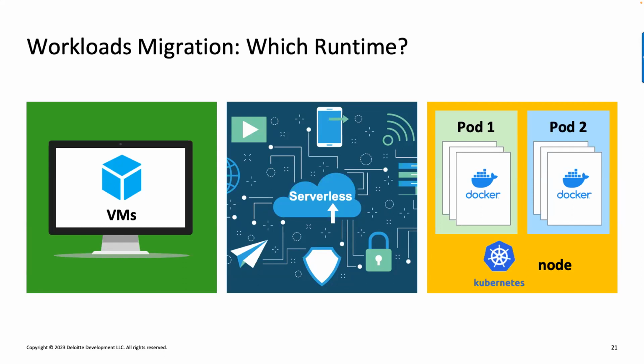So you go to that and you build the design, networking, etc. And you come across certain workloads that you have to have NIC cards for the VMs that containers cannot support. So what do you do? Well, okay, let's try to containerize again. Spend 3-4 weeks, 5 weeks, and then you fail. Then you say, okay, I'll go with VM. But the design has progressed and did not account for VMs. So what do you do? You go and retrofit the design, right? So when you hear somebody say this-first and these types of generic statements, just be very wary of them because experience says it doesn't work, right?